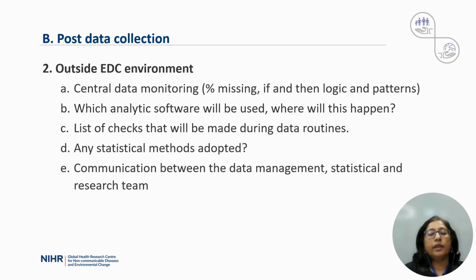As I mentioned before, you can have statistical tests to test for data quality, or you don't need to, you can just look at data patterns without any statistical tests. And these typical statistical tests will need statisticians' help, and they need to be interpreted cautiously as well. So for this particular part, it is important that even if the queries are raised, they need to be checked for their meaning. So the data management team and the statistical team, when they work, have to share it with the research team. They have to interpret it and decide on the next steps. So this is about checking the data outside the electronic data capture environment.